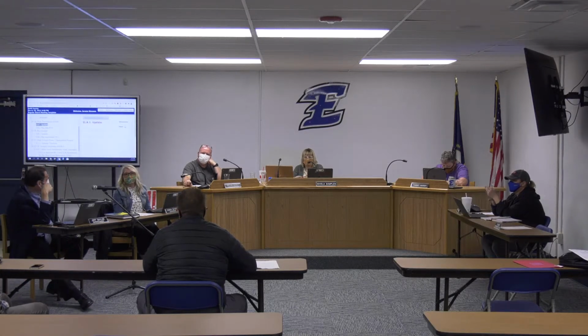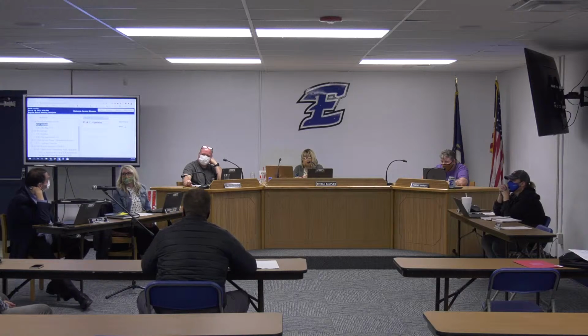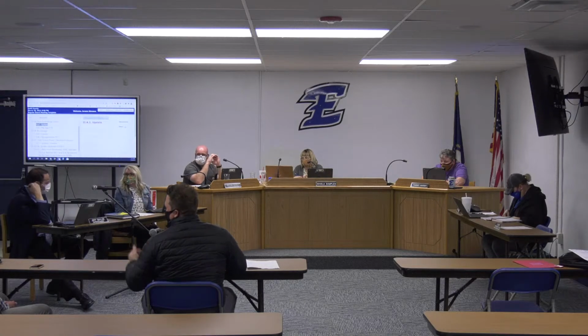So they came back with a price, and it was $95,000, which is almost the cost of the total. Pay me a quarter of that, I'll do it. That's crazy. So we will submit a PR, and there'll be a change order to give the board back right at $120,000, give or take a few thousand. Just to put that into perspective, the whole entire alternate 3 was 120. And there's nobody there that will even work with us. This is crazy to me.